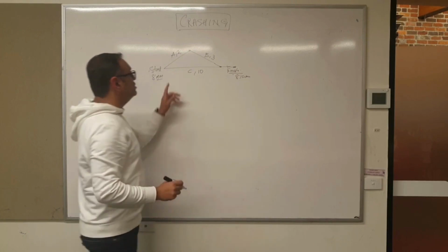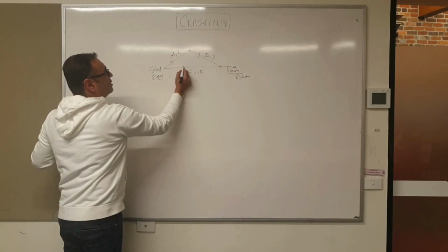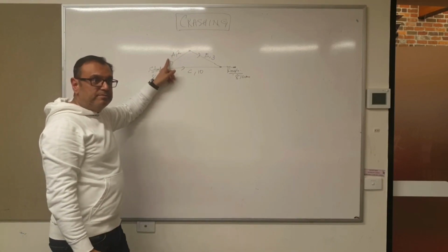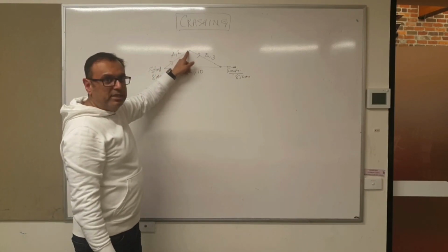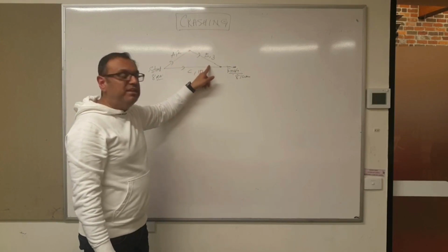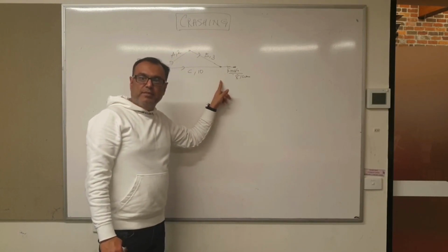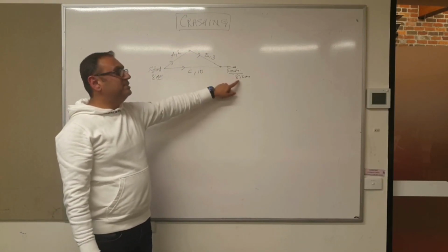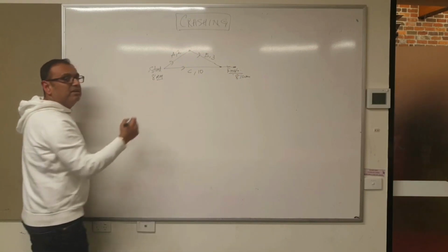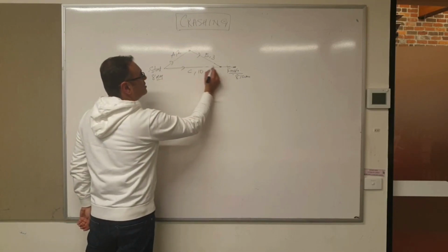a.m. Why? Because he can simultaneously start eating breakfast and downloading the email, and in the first 2 minutes, downloading finishes. The next 3 minutes, reading finishes, but he continues to eat his breakfast till the 10th minute, and he's out of the home at 8:10. Now, if I ask you what is the critical path? Critical path is C.